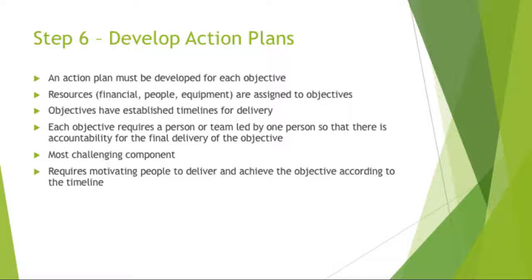Step 6 is develop action plans. An action plan must be developed for each objective. Resources, financial, people, or equipment, are assigned to objectives in order that they can be accomplished. Objectives have established timelines for delivery. Depending on the complexity of the goal, objectives may be tracked simply in a spreadsheet, or for more complex goals, a proper project is developed with a project manager who will track all of the objectives in a more sophisticated manner, such as Microsoft Project.